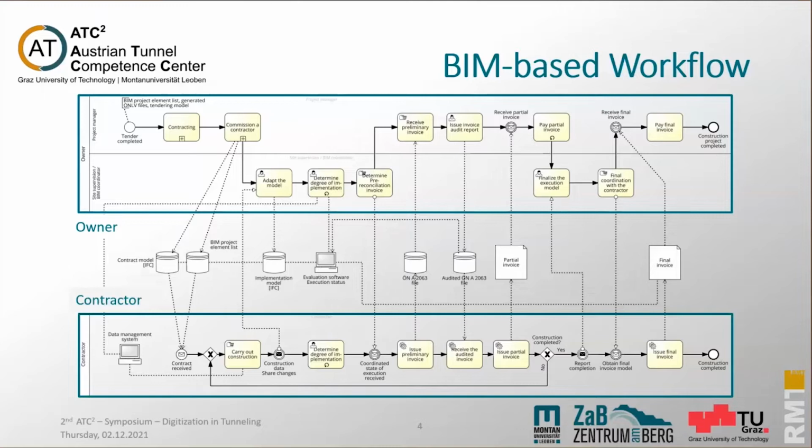I wrote it down: Nina Eder spoke about 60% just can be connected with the plan. So the rest of it, especially during the excavation phase with NATM, is data we use for invoicing, which comes from the documentation data. And that's why a digital documentation management system is necessary and also needs to be role-based, has to have some role-based access rights.